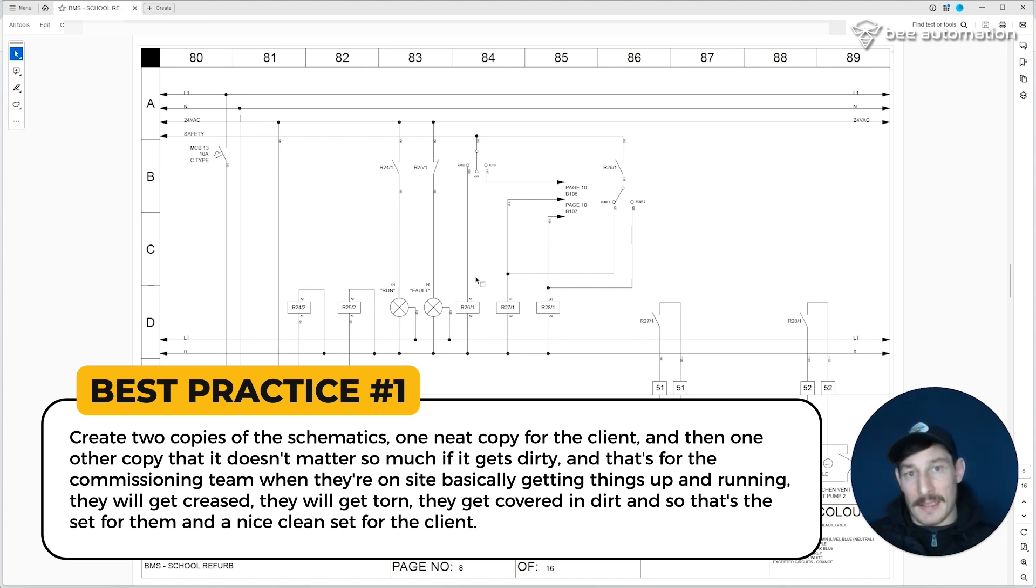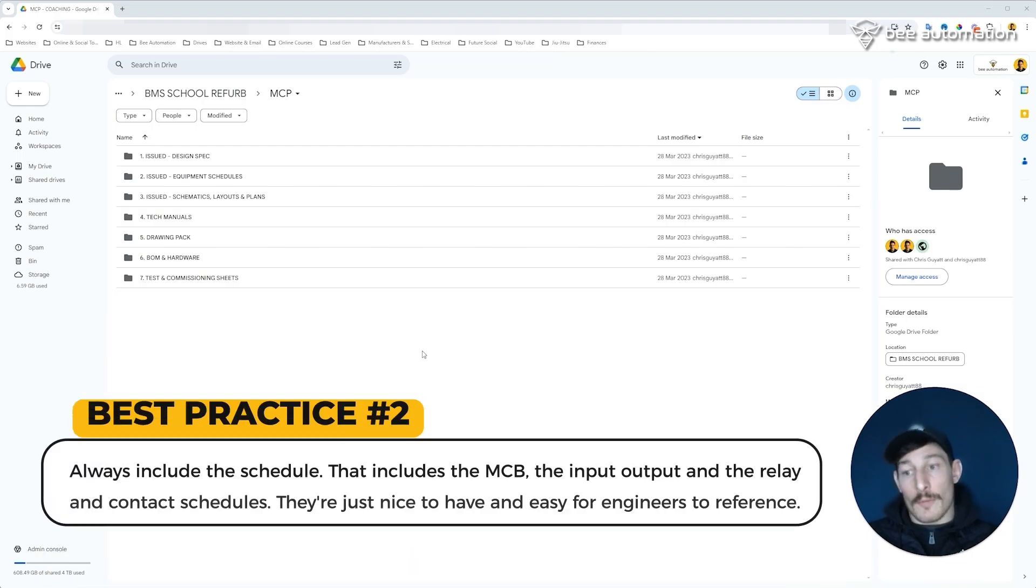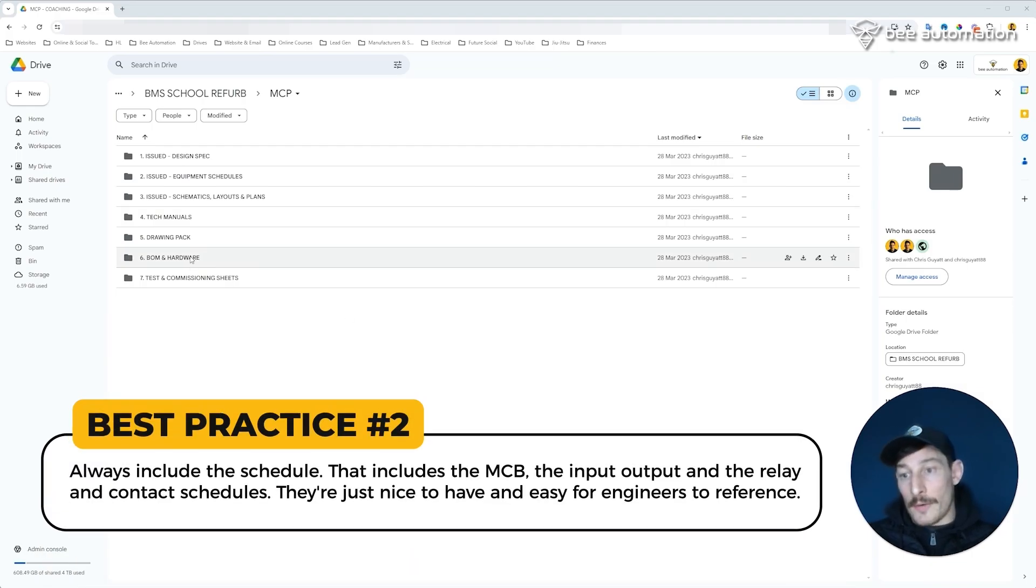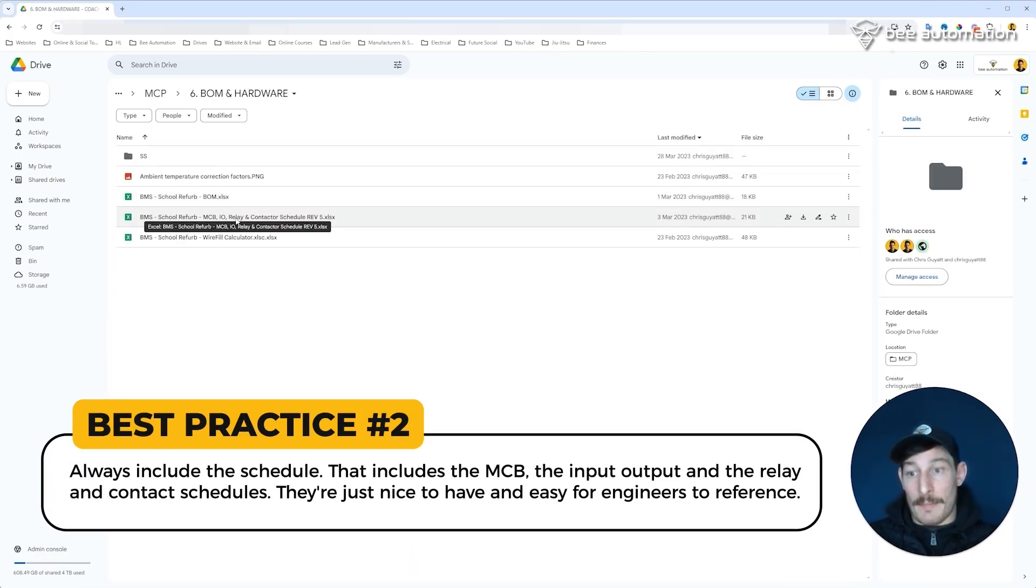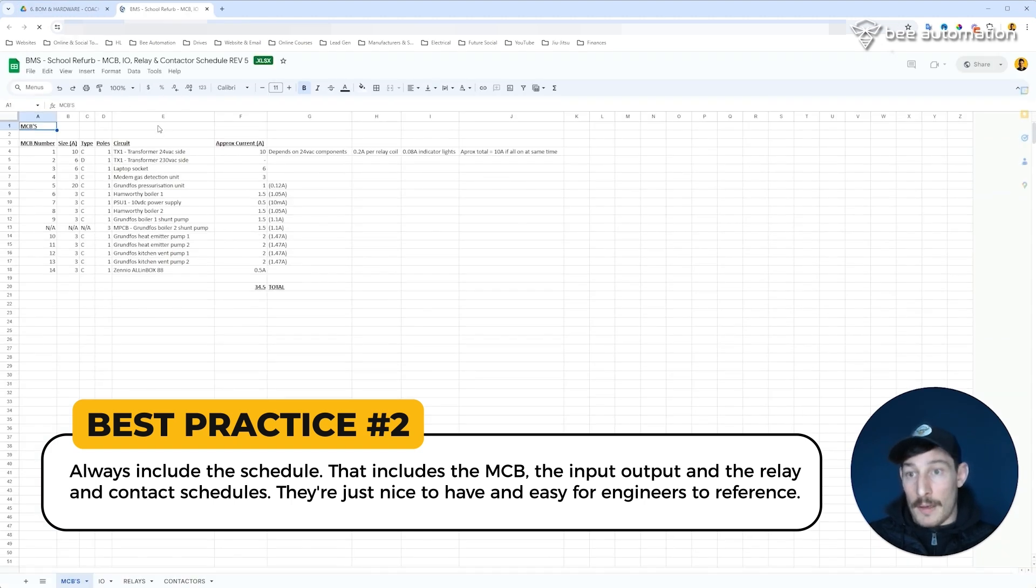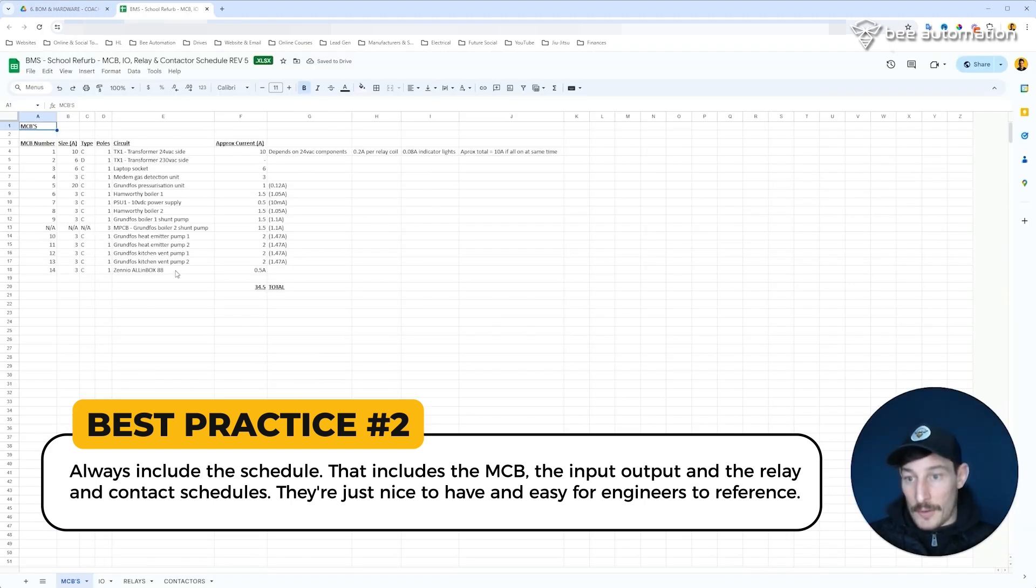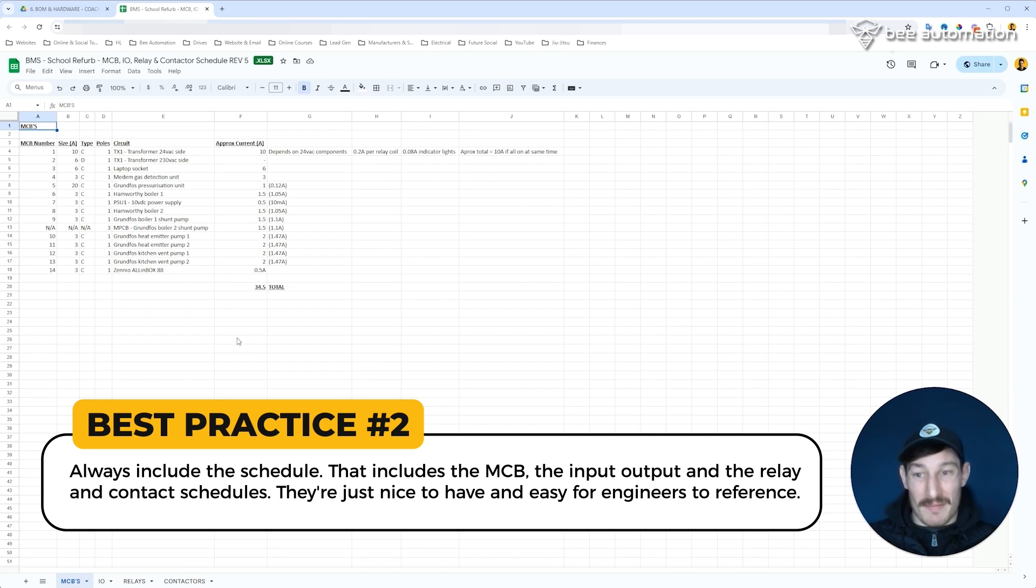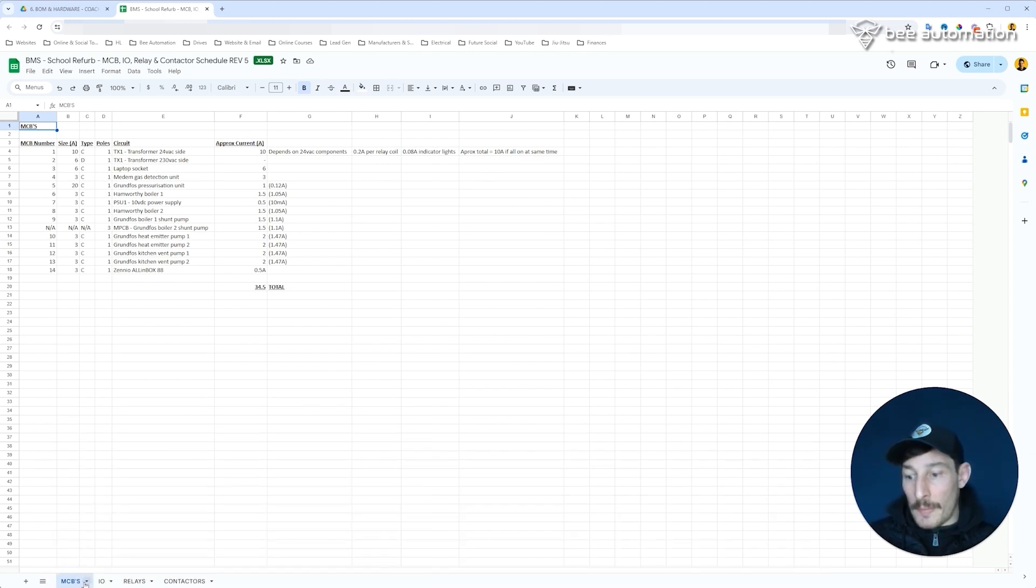Now the next thing I would always include would be the schedules, so the MCB, the input/output, and the relay and contactor schedules. I would add them in as well. They're just nice to have, easy for engineers to reference quickly. So those would be included: the MCBs, the inputs and outputs, the relays and the contactors.